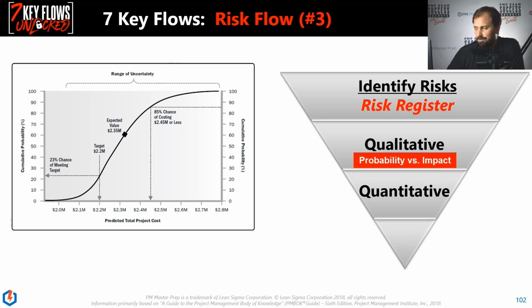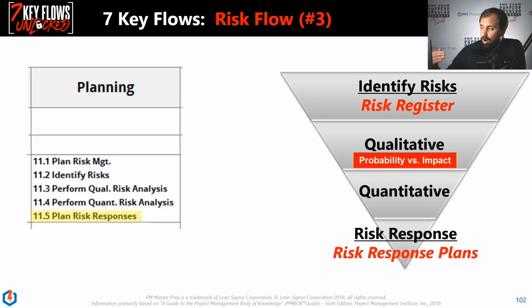This happens on big projects, right? So as we know now, we go from the qualitative to the quantitative. Then at the end, we've got a really good understanding of what the big risks and opportunities are. And we're going to dive down at the bottom into the risk response plans. These are the distinct things that we're doing to address those risks and opportunities. All right. And we have a risk owner. We have trigger conditions that tell us we know this risk is happening. Then we have plans against them, risk response plans. First thing, contingencies, backups, all the things. Think of them as a quiver of arrows, like Robin Hood or something like that. And then, see a risk, trigger condition happens, pull it out, shoot it, hope it works.